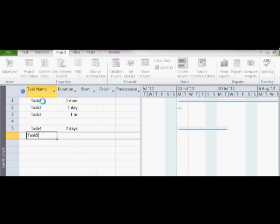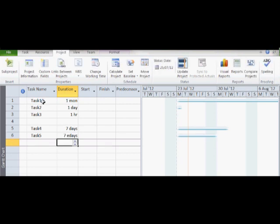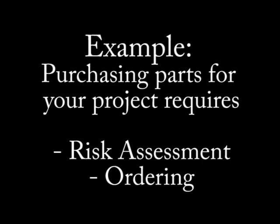If we change a duration of 7 days into 7 elapsed days by adding an E, you will notice that now all working and non-working days are counted. Now you can appreciate the necessity of entering in all your holidays from the beginning.